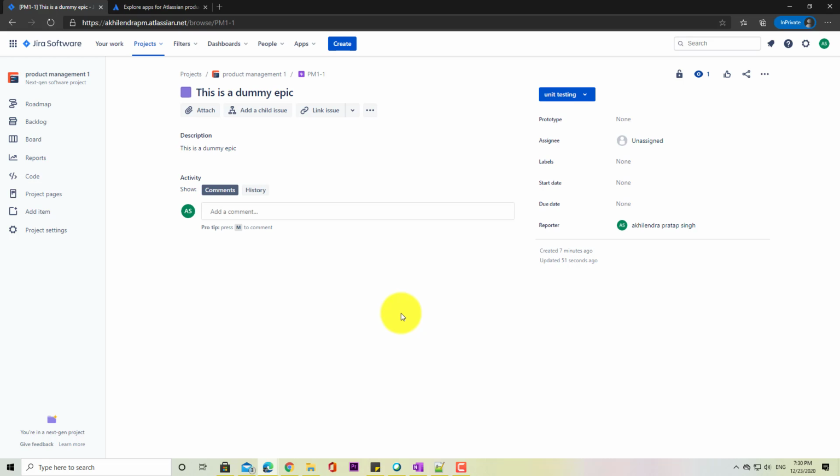Let's say again, you have 200 user stories, you are running a report. If you have 100 user stories in elaboration status, then you know that these user stories are not ready for development. Only after elaboration has been done, developers can pick them for coding. And only after unit testing has been done, we are going to mark user stories as done, because that is a very good way of enforcing standard practices.